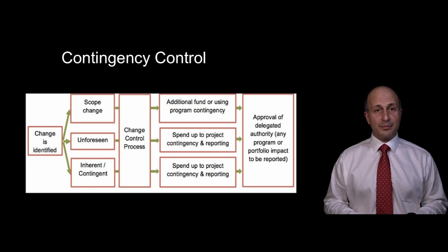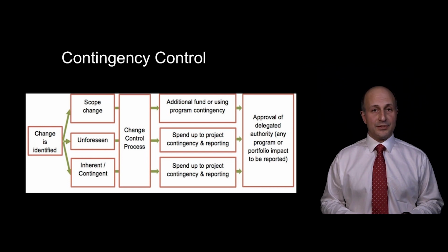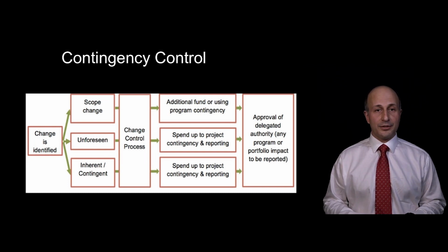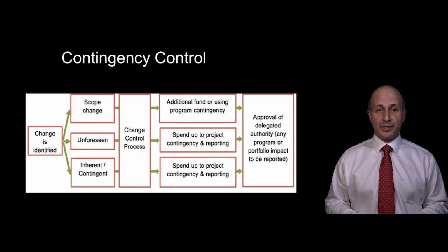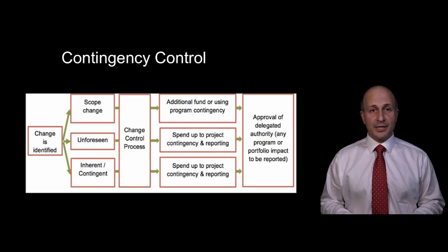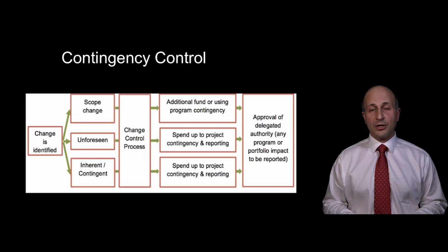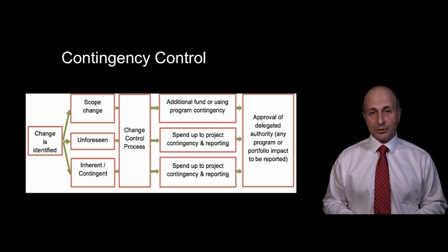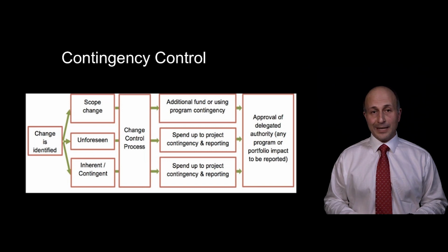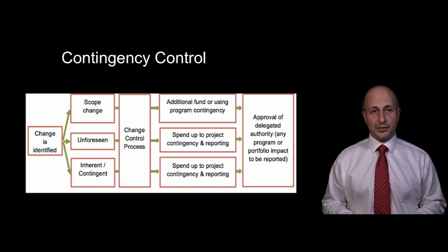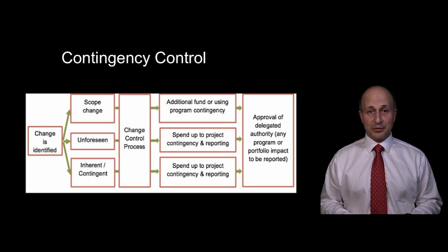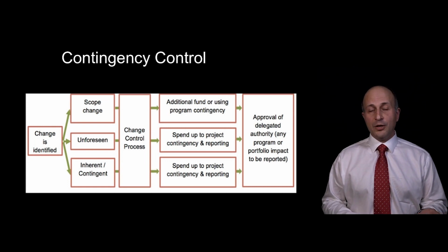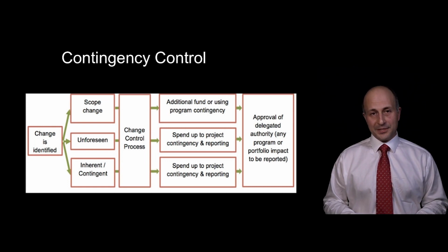A regular independent contingency assessment is recommended to assess the required contingency allowance for the desired confidence level, for example, desired contingency. The comparison between the desired contingency against the available contingency will provide valuable knowledge for management decision on release of contingency, request for additional contingency, or retaining of contingency.